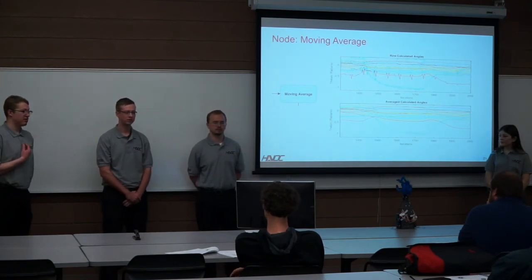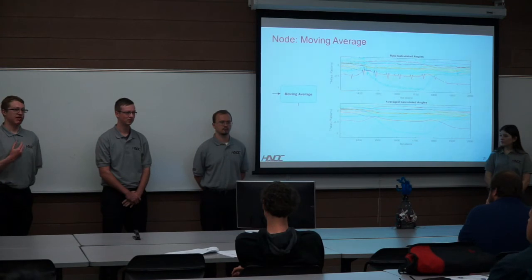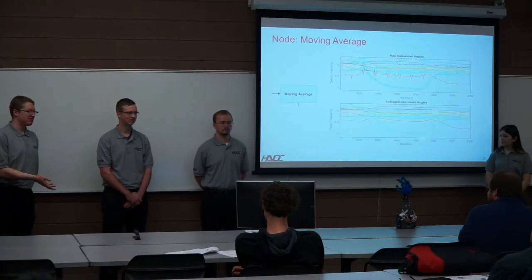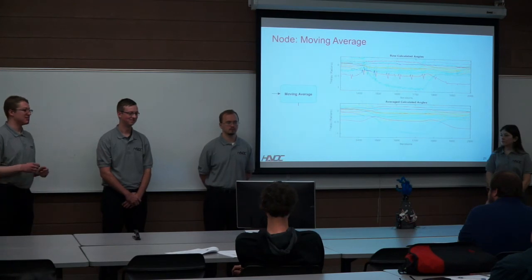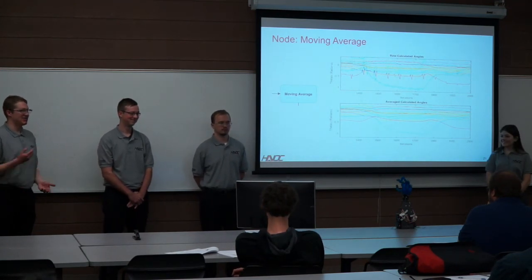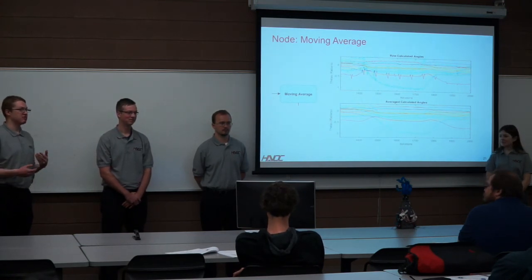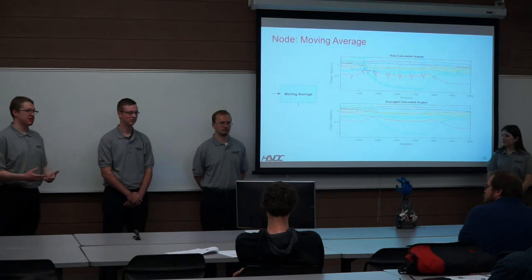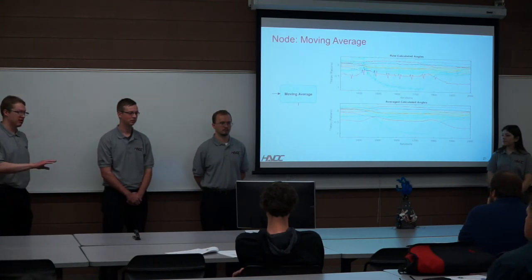For me, I would have given my past self a better estimate on the servos that we would need for the system, since I had to redesign the forearm multiple times as we changed which servos we were using, and that caused several delays. I would have also told myself to get more of a team collaboration onto the software, because if we had gotten that done,